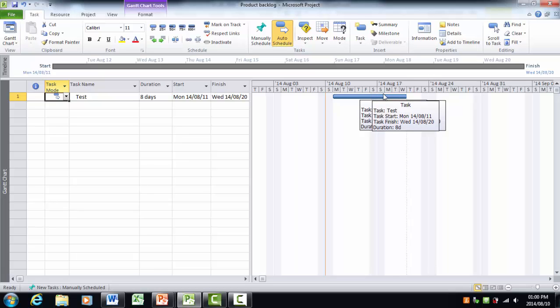It then ignores Saturday and Sunday, and it then gives another 3 working days to give the 8 days to schedule the task. In a normal working environment, this is the way that we want to do it, because at the end of the day we don't want our teams to work on weekends. This product backlog that we're planning now, though, is a little bit different, because you are students. You basically will be working every day, and you will especially be working on Saturdays and Sundays.